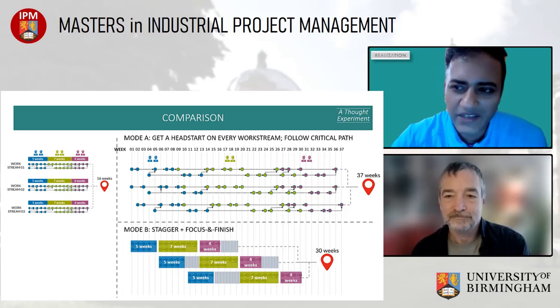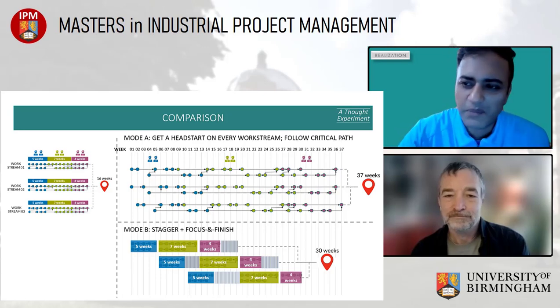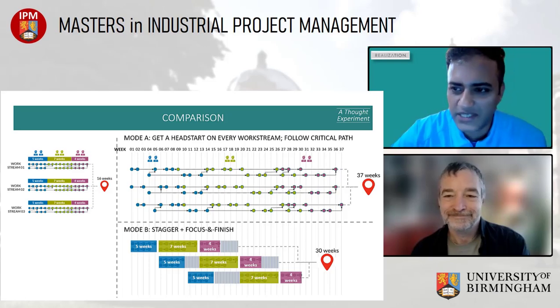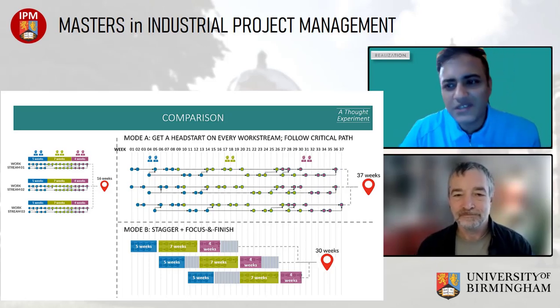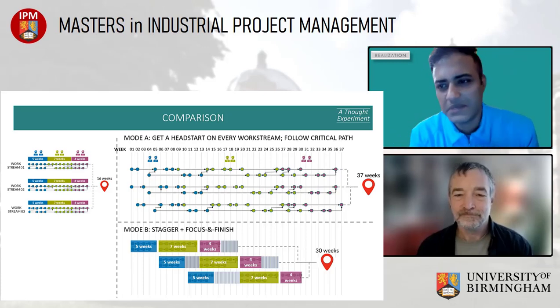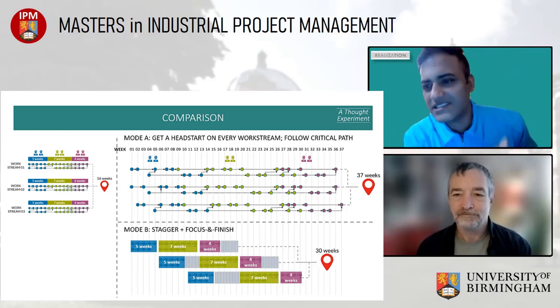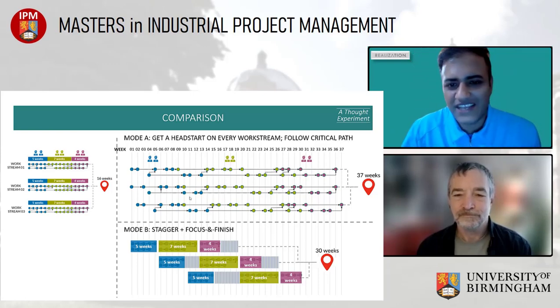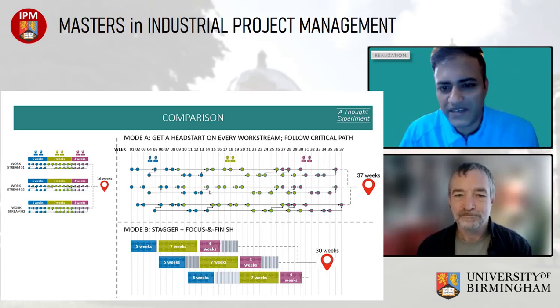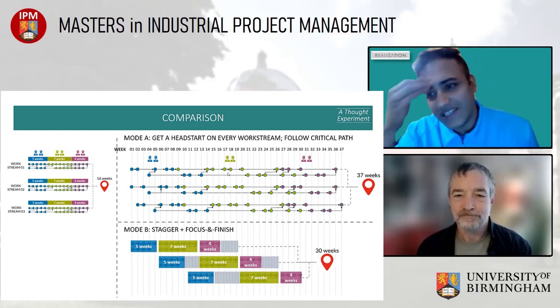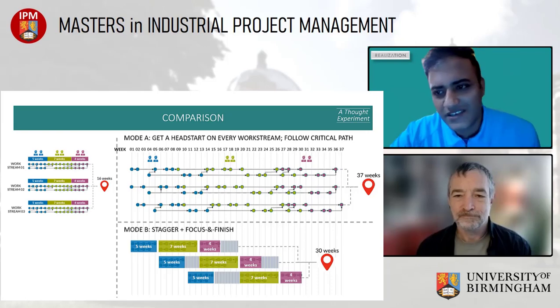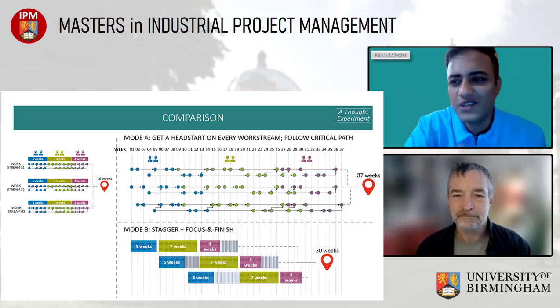There's another practical problem, which is even at the dot level, there are further levels below. So when you're saying mapping the MSP or Primavera plan with my knowledge center database where my list of drawings are, then also there is a mapping issue. And then with the MSP Primavera to the batch level, there is another mapping issue, because the batch level is still higher than this picture above. So this is the MSP Primavera plan. And below it, there is basically the list of knowledge center drawing lists, which have to be also attached to this. So basically there are multiple levels.